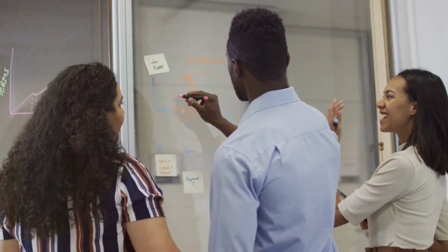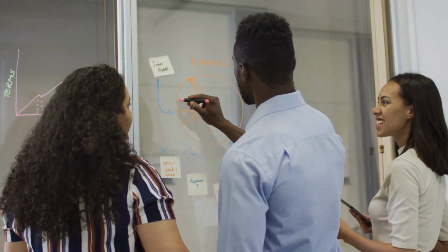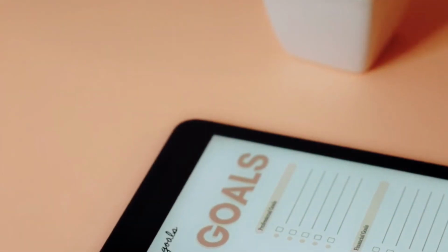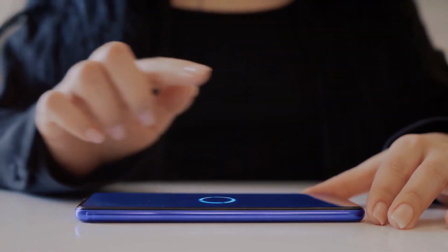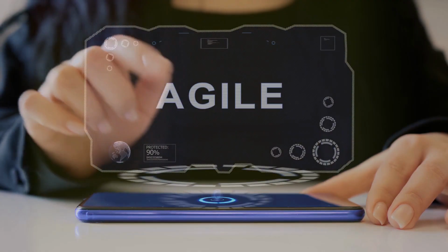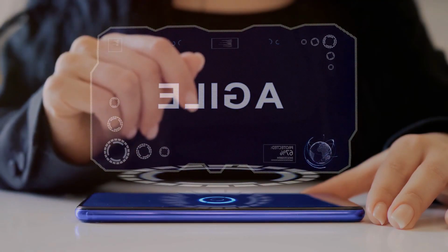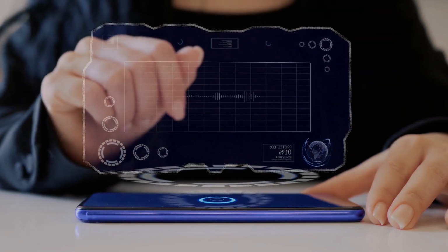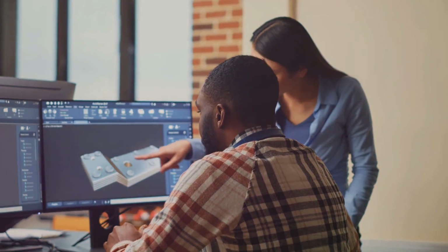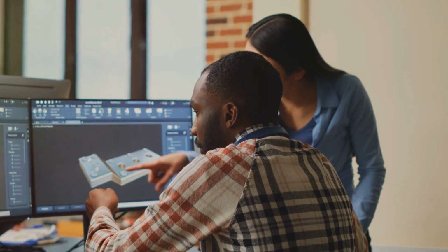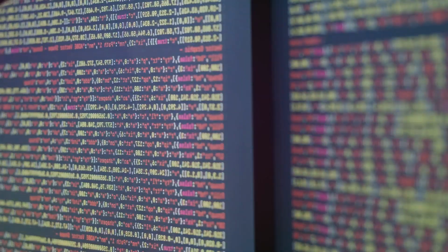Once you have your information, the next step is to craft a well-structured AI prompt. This prompt should tell the AI exactly what you want. An agile epic that includes a title, description, business value, and acceptance criteria, including details like timelines, constraints, and technology preferences, will help the AI produce something that's not just generic but truly tailored to your needs.